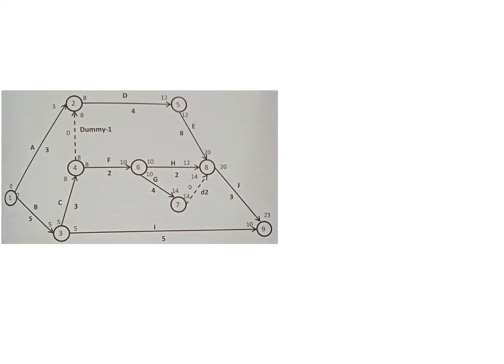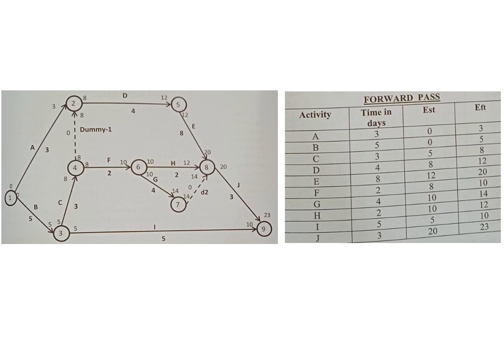Let us look at the network flow over here. Now we'll start. Let's consider the activity D. Activity D cannot be completed without the completion of activity A and C. A and C are the preceding activities for activity D to happen. Right? So you have the earliest that it can start. The earliest that activity D can start is 8 days.